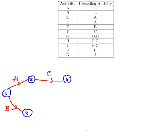What about activity D? What depends on activity D later on? Activity G depends on activity D, but it also depends on activity E, which in turn depends on activity B. How are we going to factor with that? What we're going to do is set up a node here, node 5.